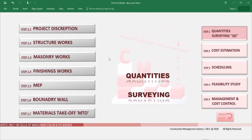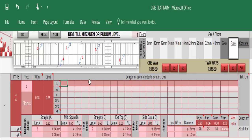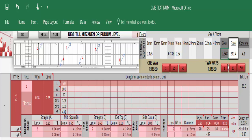For example, for ribbed slab work, we just enter the length and width of the slab and the reinforcement of the ribs. CMS directly provides the number of ribs, the solid parts required, and the number of hardy blocks required for this type of slab, along with all details: the rebar quantity, the quantity of concrete, and the number of required blocks — all automatically.